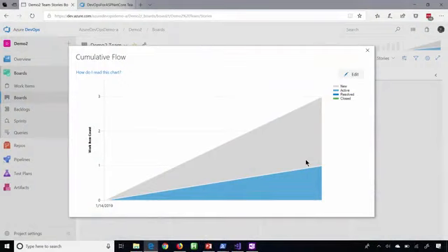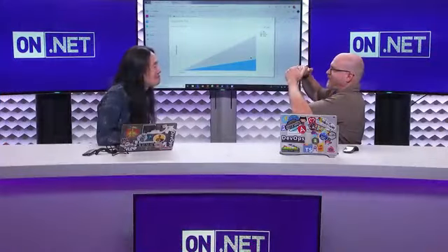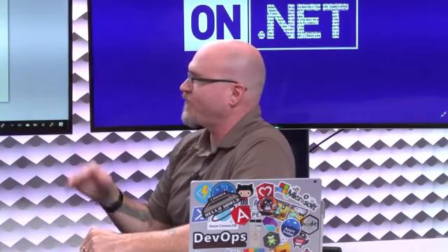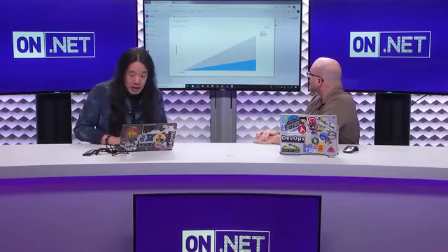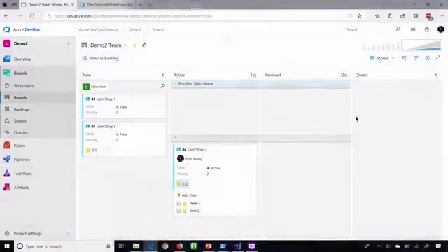These are charts that, if you have a Scrum Master, they can use to judge and view, oh, how's the progress? What's the progress my team is making? So this is how we can do projections and estimates. We start to see closing between open and done tasks, and where they converge is where we think we will be done.